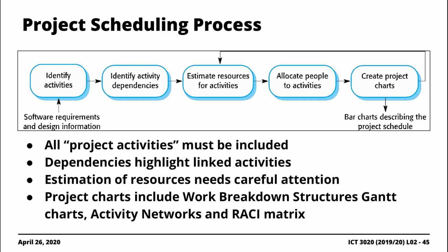We know that, for instance, we're going to have to do project presentations. We're going to have to write proposals, right? So all those different activities and sub-activities will need to be identified. And then you identify dependencies that might potentially exist in between the different activities, right? And again, as you're identifying the dependencies, you try as much as possible to minimize the dependencies that might exist.